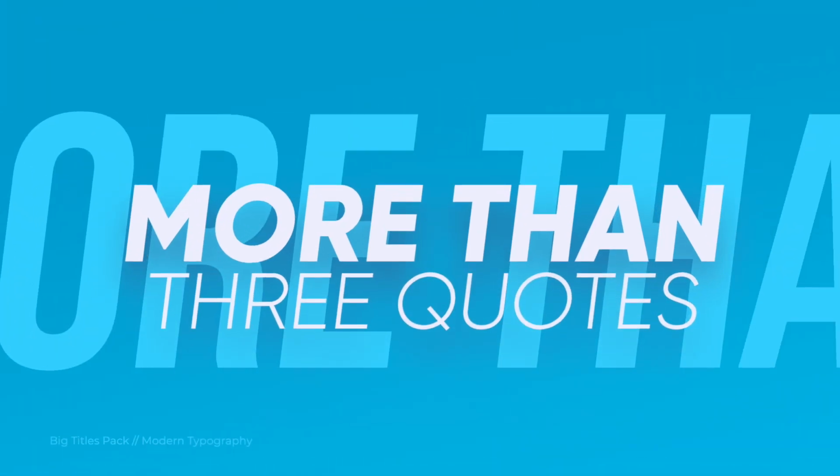The next step is actually getting a quote from them. So my suggestion is to get more than 3 quotes. And the reason I say more than 3 quotes is because we want to end up with at least 3 quotes so we can compare.